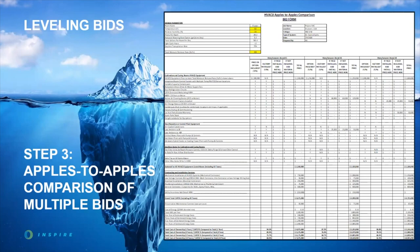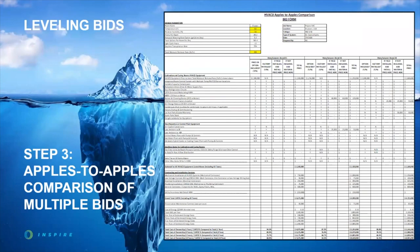You really don't have any idea how to make that decision until you consider the installation cost impacts of each of these systems in order to get a total CapEx budget required for your project. We approach this challenge with what can be called a bid form — and it's hard to read because there's a lot of detailed information crammed into one spreadsheet. But we need to know a lot of this detail about the HVACD system to be sure that the systems serving the cultivation and curing rooms have all the appropriate options required to perform the duty of proper environmental control. This might be the right type of filtration and air cleaning included, the right type of redundancies in different parts of the system, maybe a room control system that allows the cultivator to focus on cultivation and not constantly adjusting a thermostat.